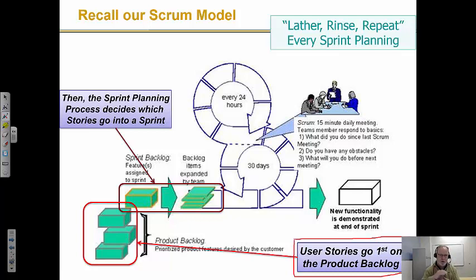You can still add a stack of cards with story point value on them to the product backlog. All right, that doesn't mean the team works on them right away. What's going to happen is in the sprint planning process, when you sit down, developers are going to tell you what the cost of building different value is, and you do that negotiation we just talked about, and that defines what actually gets put on the conveyor belt during this time period. All right, and that's the trusted agreement. That's the promise the development team makes to build the value, and now they go forward and figure out how to do that.